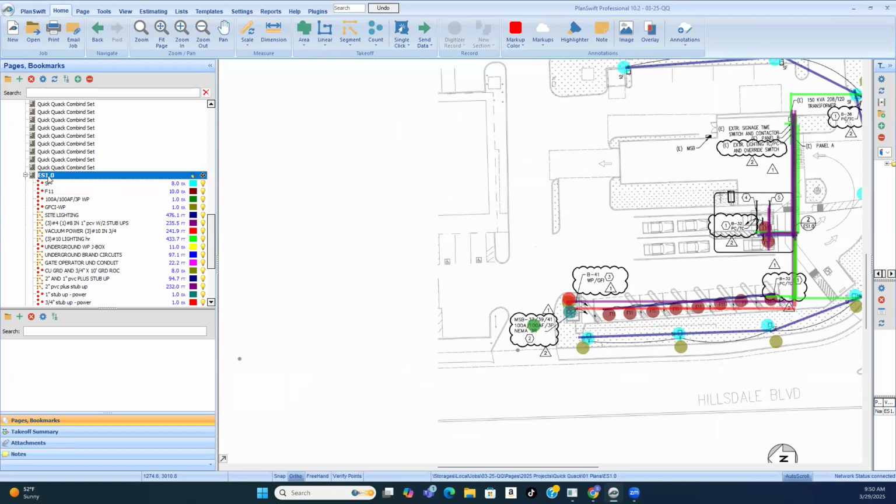Yeah, that's probably just a trench. But then you figure if it's a trench, it's got to be at least the size of, because we're putting in what, 1 inch pipe, 1 1/4 max. Maybe some of them are 2. But then you have to give it at least a foot on each side of it, right? To place it, to put gravel, the bedding in it.